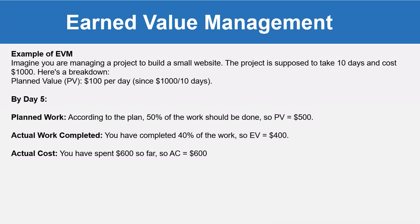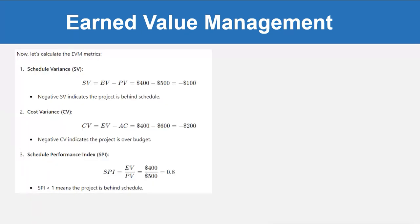Assume that you are standing on day five out of the total 10 days. According to the plan, 50% of the work should be done, so PV equals $500. However, actual work completed is only 40%, so EV equals $400. The actual cost you have spent so far is $600, so AC equals $600. Now let's calculate the EVM metrics.